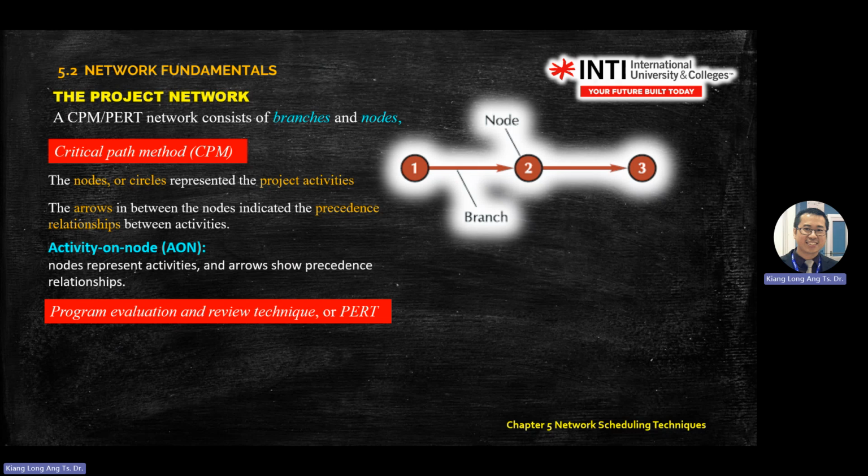A careless mistake in tests is that some students forget to put in the arrow. They just draw a line, so the whole network is wrong because you're not giving direction. The component, the circle, is called a node. The arrow is called a branch.